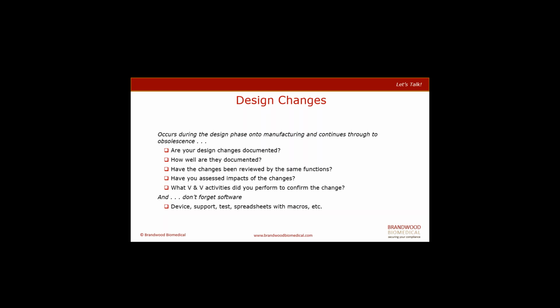If not, why not? Just put your justification in place. Have assessments been undertaken for the impact of those changes? What V&V activities were performed to confirm those changes?